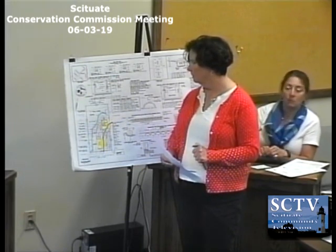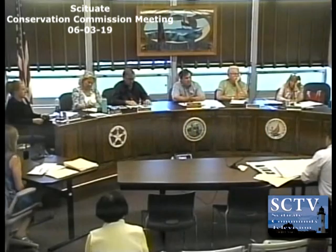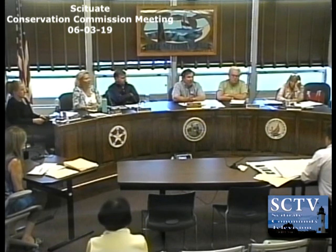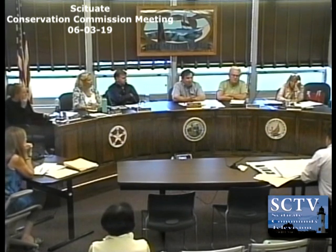Greg, the perk tests, how many test holes did you do on that? I mean, we're not in the business of designing a system, but oftentimes we do look at it. When we look at locations of septic systems, our preference would be to see them as far away from a resource area as possible. That's virtually impossible here, and it looks like that corner is the correct spot to put one if it's going to be there. So that's typically how we start. We look at the location so that I can stay as far away from your jurisdiction as possible. Well, can I point out that there's a resource area across the street that's not on the plan either, which would put that corner in the 50-foot too? Sure. So I started in the front right corner. We did 2 perk tests in that front right lawn area.